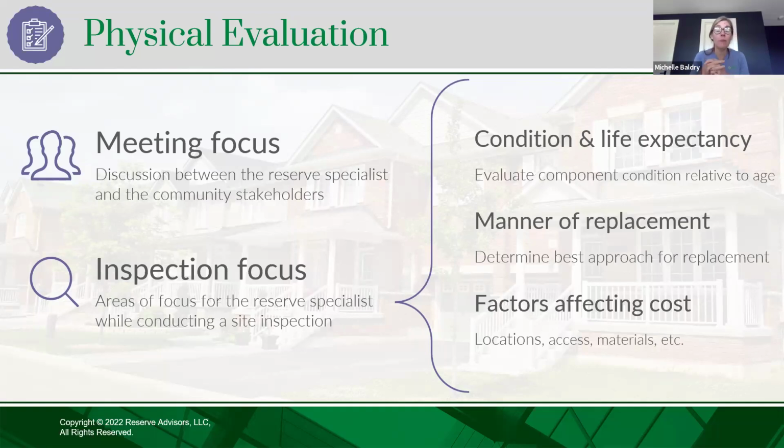If we are doing repaving work, if you have private streets, that's a good time to also do some curbing or maybe some sidewalk repairs, right? So we will do the best we can to coordinate these projects, but also make sense of what's the most cost-effective way to do it, right? We're not going to prematurely do things just to coordinate if you don't truly need to do it.